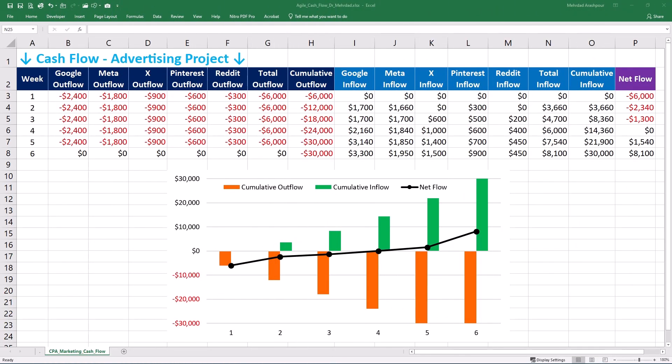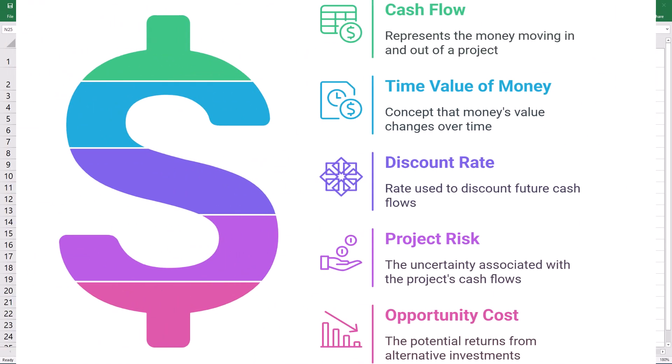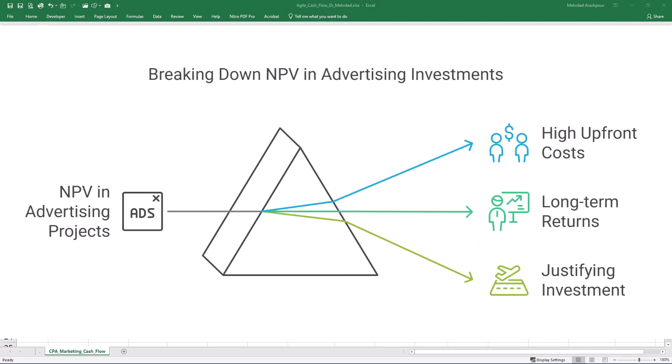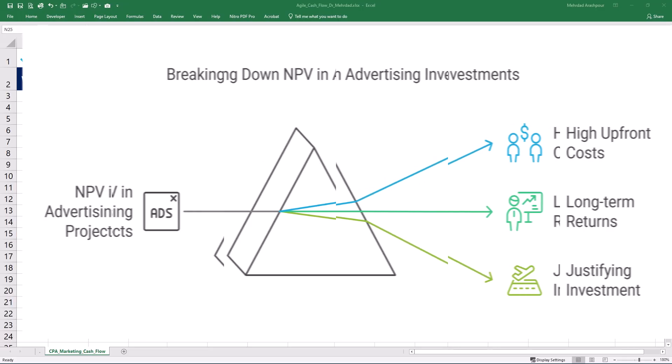Net present value or NPV takes cash flow a step further by considering the time value of money — a dollar today is worth more than a dollar in the future. NPV discounts future cash flows back to their present value using a discount rate that reflects the project's risk and the opportunity cost of capital. A positive NPV shows that the project is expected to add value to the company. For example, when evaluating a new advertising project with high upfront costs and long-term returns, NPV helps you assess whether those future returns justify the initial investment.